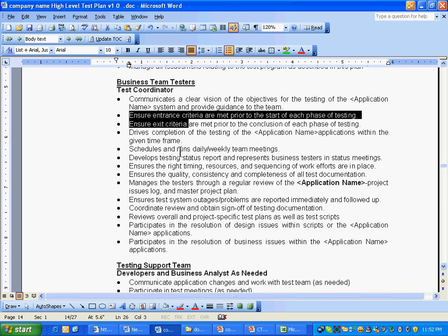So that's a special thing about exit criteria. They might be having a different exit criteria. They might say out of 100, if 85% is passing, then we'll just accept the system. That's fine. So now you understand the meaning of entrance criteria and exit criteria. You understand or not?